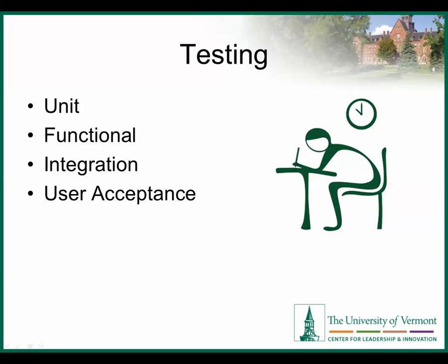So testing, as far as adoption, it's important that you have testing of any system. You don't want to have any gotcha when you go live. So unit testing, this is when a builder is testing their own code. Functional testing is when you develop a script with a set of instructions, like placing an order for a medication which gets administered by the nurse and then documented on the MAR. Integration testing is incorporating several systems together, like a physician ordering a lab, which goes to the lab system and then gets resulted back to the EHR.